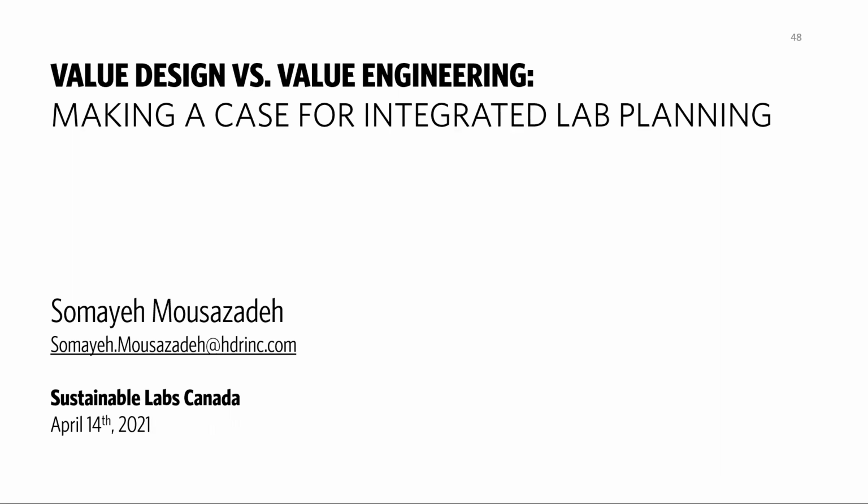And in a non-IPD environment, for example, in the York project, which is a CM, the CM is inviting some trades to provide design assist early on. Their input is really helpful for our project. It made us rethink some of the solutions with what we understood from their input.